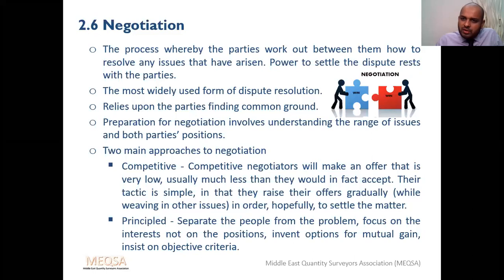If you have 100 disputes, you can resolve more than 80% of those disputes within a good negotiation, before going for other ADR or dispute resolution methods, with very minimum losses. You lose very minimum, as there is nothing to pay to a third party. Well-known people are going to discuss at a very bottom level, QS to QS, project manager to project manager. They know what the consequence is. So it is a very effective dispute resolution method. Then I will move on to the next point.